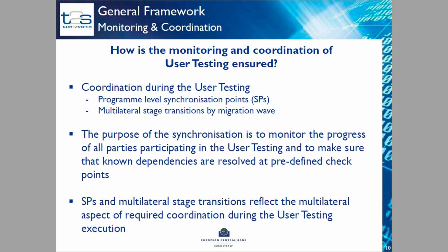Each wave will move from one synchronization point to another in the same order. But of course, because they go live at different times, the synchronization point timings are different. And this is where it starts playing on the calendar, how long certain testing stages last, and how much time there is to test certain situations.